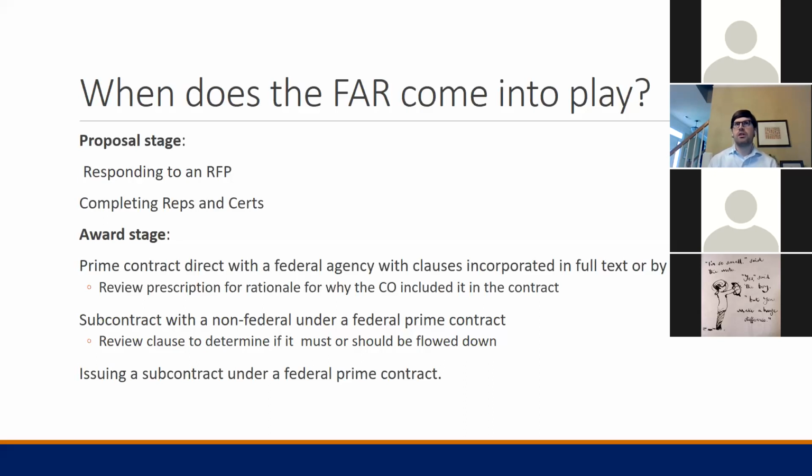And so at that point, you're outside of complying with the regulation itself. You're basically just negotiating terms with a prime contractor on whether or not we'll accept that term. So it's an important distinction, because one of them is legally required, and one of them is just a regular negotiation. The same analysis happens when, say, the university accepts a prime contract and then is making a subcontract to another university or nonprofit.